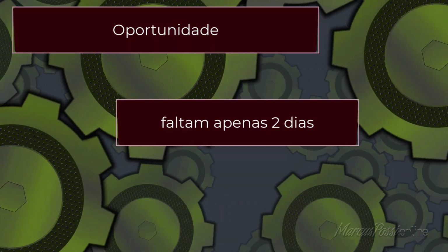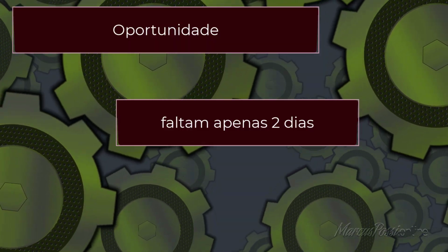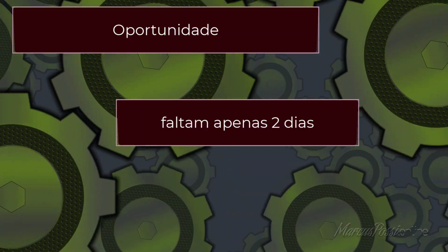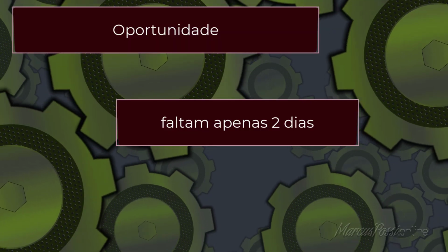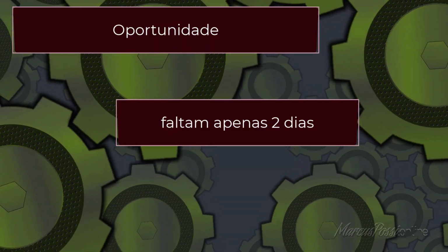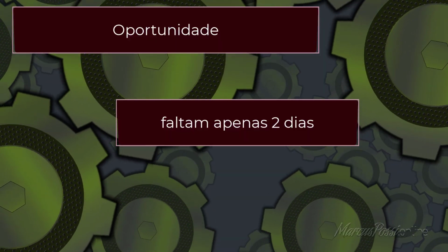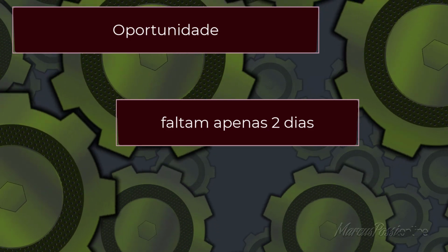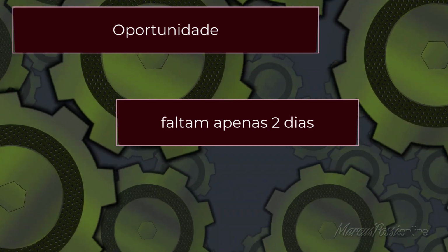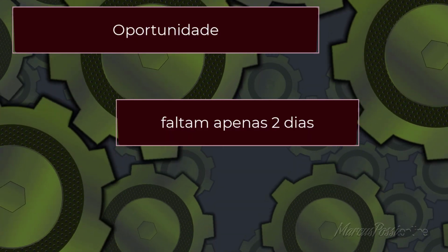It's dynamic, iterative. This module is really the engine room. It uses CPM to figure out the timing. Right, the critical path method. So what are the core steps they teach? The absolute must-haves for building a reliable schedule. 4 fundamental steps. First, finalize the scope in WBS, know what you're building. Second, insert and characterize the activities, turn that structure into a network, assigning realistic durations, calendars, linking resources.